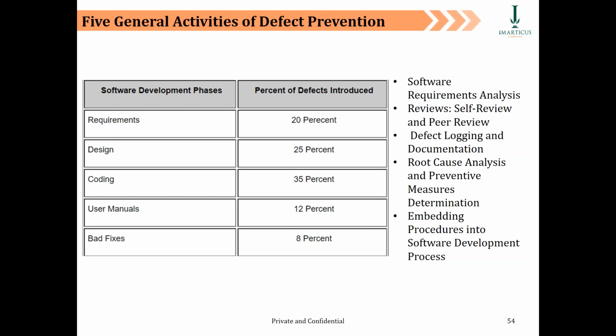Design, which is the functional specification, design specs writing. So the entire specification is contributing to almost 1/4 of the defects. If you look at coding, it's close to 1/3. So 1/3 of defects in the Agile lifecycle come primarily from the coding perspective.